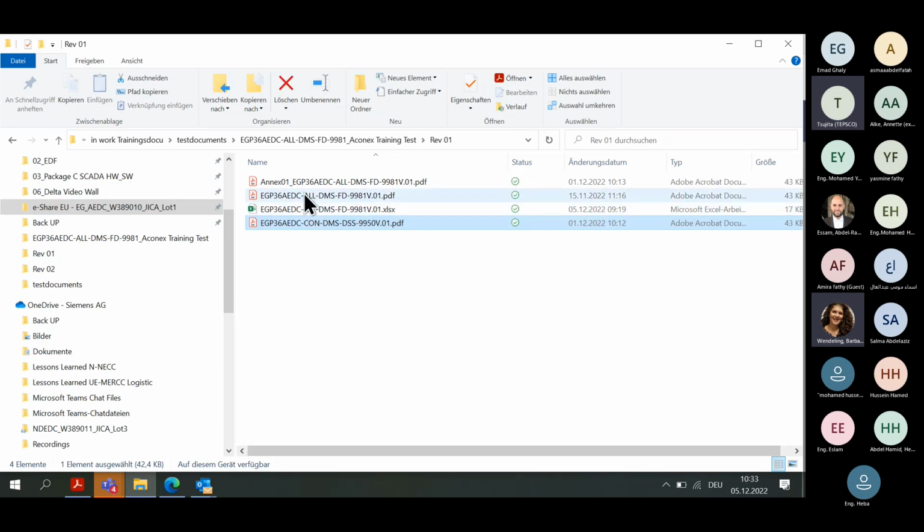As well as we have here dashes and not slashes, for example, because if you use a slash, Aconex will not know the document number. And then you see you have to fill in all these fields manually, and they will not be filled automatically. This is also really important, that we use this document number also as the file name.